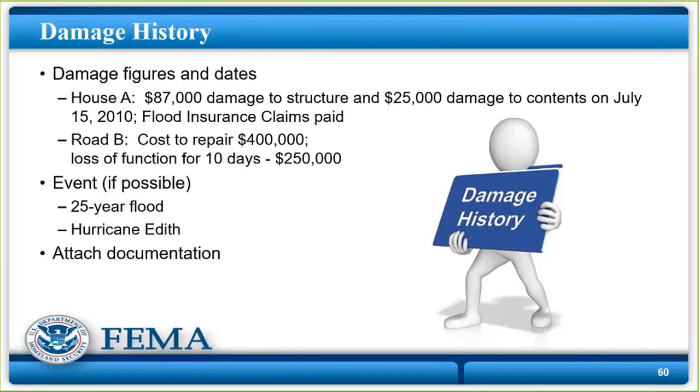Like I shared with you, there was a really bad flood here in Washington in 2006. There was another one in 2007, and another one in some parts of the state in 2009. So there's relatively recent information. If you don't know what it is, tell us what the characteristics were. If you say you don't know how much damage was done, try to find it. Or tell us how deep the floodwaters were, or how long the bridge was out, and there are some ways that the estimated damages and the estimated functional loss can be determined.